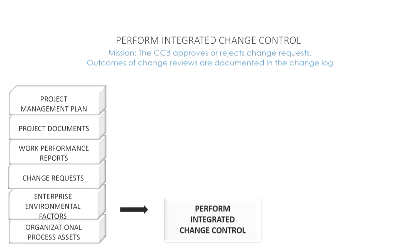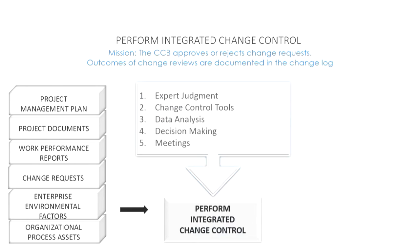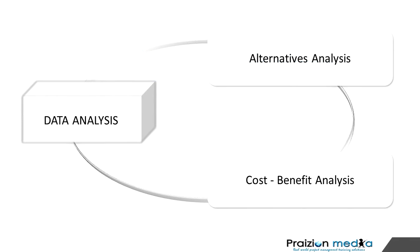Let's take a look at the tools and techniques. The first is the usual suspect — expert judgment. The next is change control tools, which refers to any tools used to capture, review, and disseminate change requests. A popular example is called Change Point — a virtual change control board where a change request comes in, one person approves it, and it moves to the next entity. Next is data analysis, which includes alternatives analysis — looking for alternatives — and cost-benefit analysis: what is the benefit of this change and what will it cost? At times you need to do an analysis to fully assess if a change request should be approved.